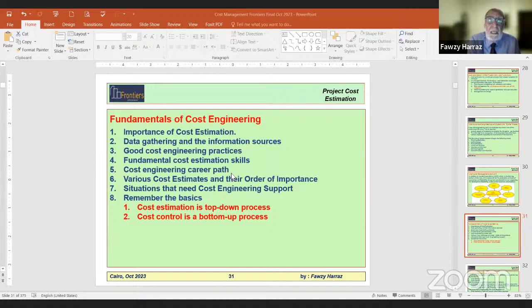Okay, the remaining bids on the project will be commercially evaluated on schedule, not cost. I mean, we will be taking the fastest delivery of the equipment so as to improve the schedule. The difference normally between the bids is very marginal on the cost, but the delivery can be much better to support our case of schedule recovery. So this is one option. Another option is maybe to change the markets.